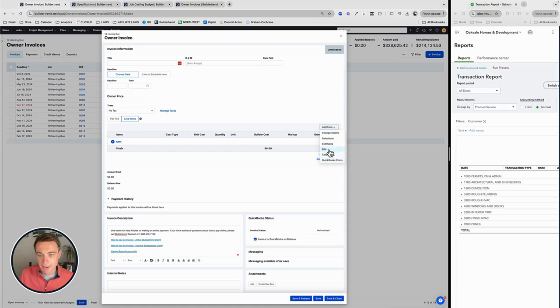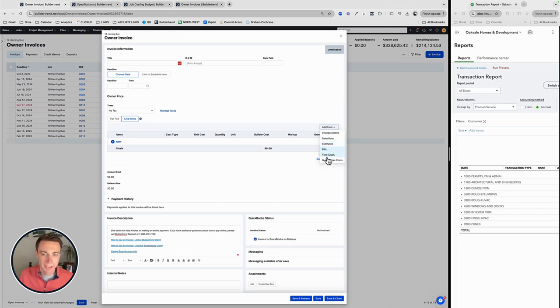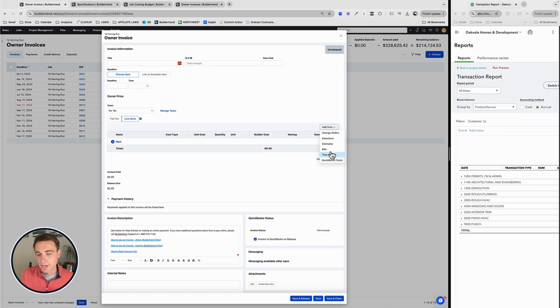Selections and estimates you can certainly do as well. The bills, time clock, and QuickBooks cost is where I spend most of my time. When I do a selection, when I do an estimate, I'm typically not going to bill that to a customer until I actually incur the cost. That's how I set up my contract. These will show up here.